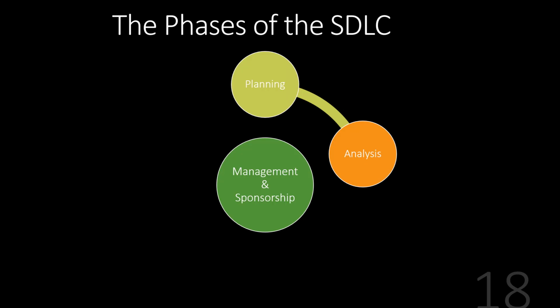So in the analysis, we get down another level of depth, and that's something to keep in mind with each of these phases. Each phase is an order of magnitude larger than the previous phase. So the further you get into the project, the more resources, i.e. money and people, you have sunk into the project.